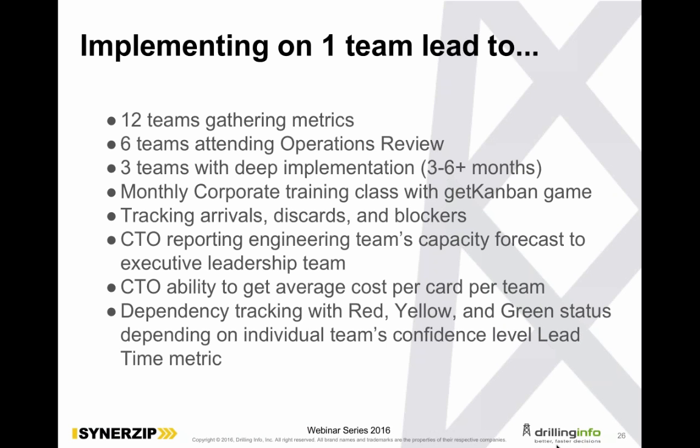So it stays green unless you start after your 90% histogram lead time, and that says, oh, now you're incurring risk because you only have a 65% chance because you're starting later. And this provides a really good point for discussion about, maybe it is something that's super small that your team says you can get done in 3 days, so you don't need to start it. But now you have a way to kind of prompt those discussions and make that happen.